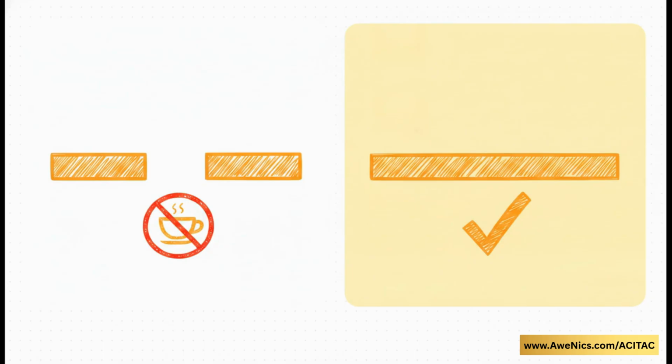But think about real-world site work. If your crew is on site from 8 a.m. to 17:00 and you are paying them for a full 9-hour day, even if they take 45 minutes to eat a sandwich, entering a software break will totally wreck your cost calculations. To fix this, just select that second row, hit Delete, and change the first row to be a single continuous shift from 8 a.m. to 17:00. That way it accounts for all 9 billable hours perfectly.